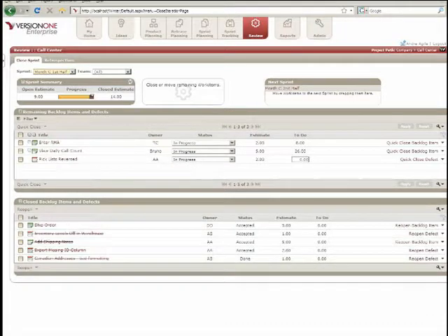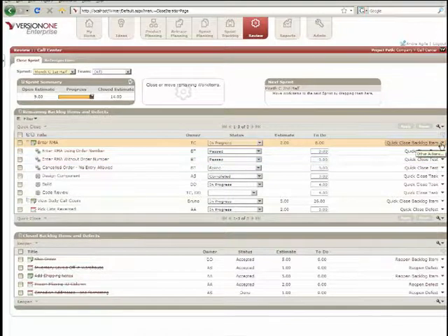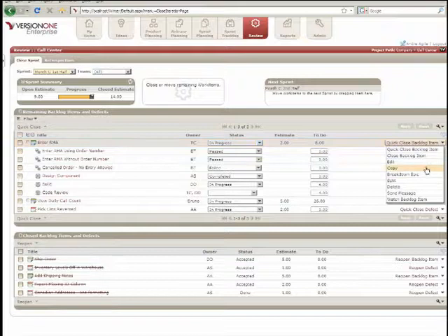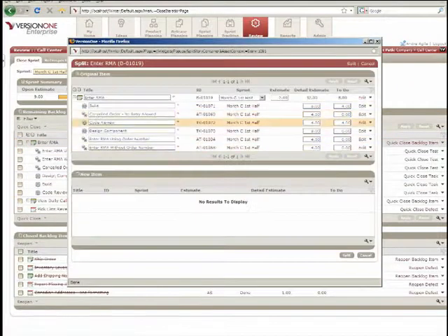Or alternatively, product owner, we didn't get this user story completed. We tried real hard. Half the team came down with the flu. Sorry, but we just didn't get it finished. So sometimes you have to split that user story. What that means is you're actually creating 2 user stories from one. Again, this is an exception, not the rule.